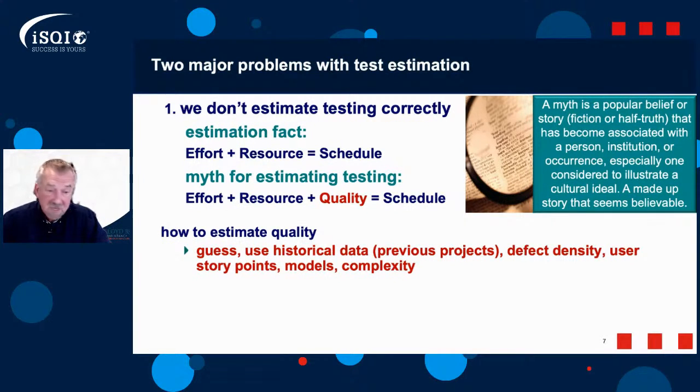Nothing's changed, so we're going to find 30. Why don't we use story points if you're in Agile? A story point relates to the complexity or the size of that story. So if I've allocated 1 story point for a particular piece of work, then I could say, well, in that 1 story point, I'm going to find 1 defect. I've allocated 13 story points, we're going to find 13.